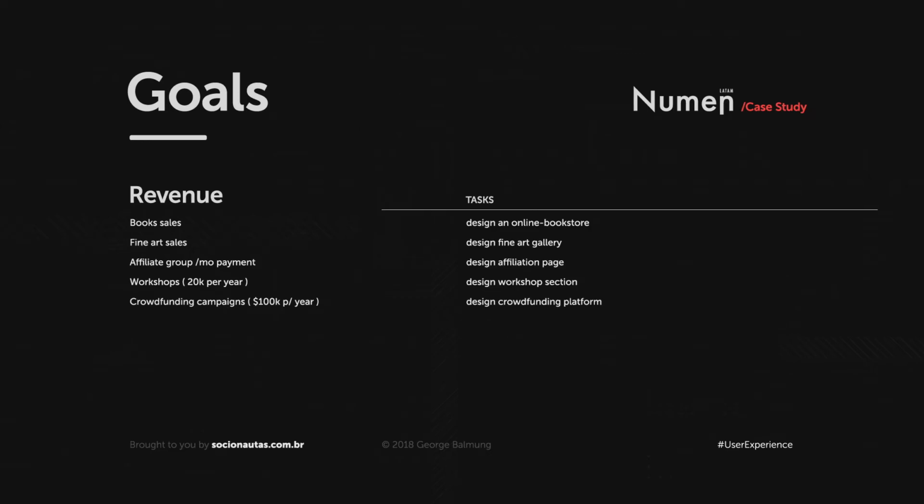Then we translate our goals into tasks and attribute values from the Fibonacci sequence to impact, feasibility, and urgency to make high-value tasks emerge. For example, in order to achieve your revenue goals, we need to do those tasks. We attribute values to impact. How much do those tasks impact your business? The higher the number, the higher the impact that the task has.